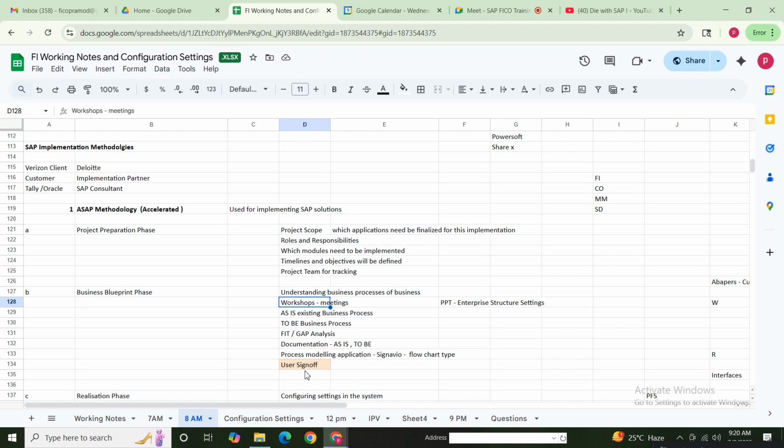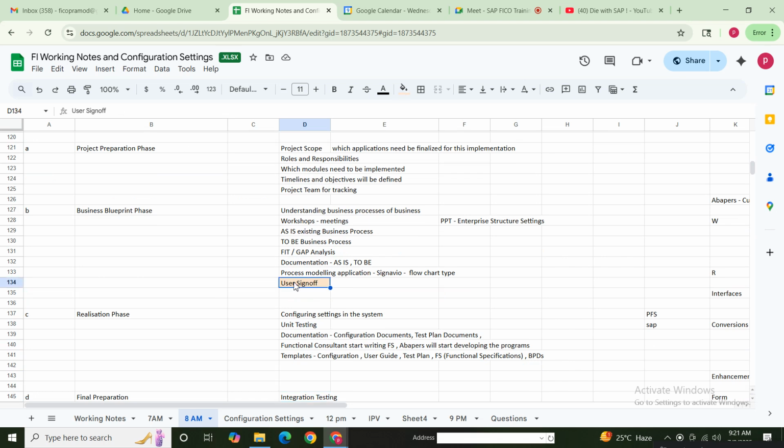The sign-off is very important because to proceed further, to start actual practicals in the system, we need to know what should be done from the financial accounting perspective, from the SD side, other modules, the HR side, and so on. Once we get the sign-off copy from the business side, we'll start doing it in the system because we already discussed with the business during workshops. I got the details, and we also decided in the blueprint what needs to be done in SAP. Now I know everything that needs to be defined in SAP system. Now we'll start the realization phase.